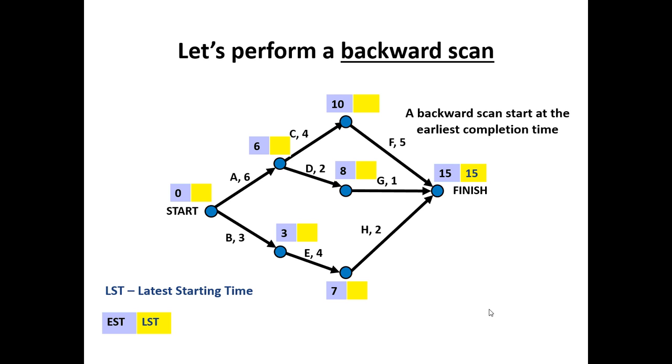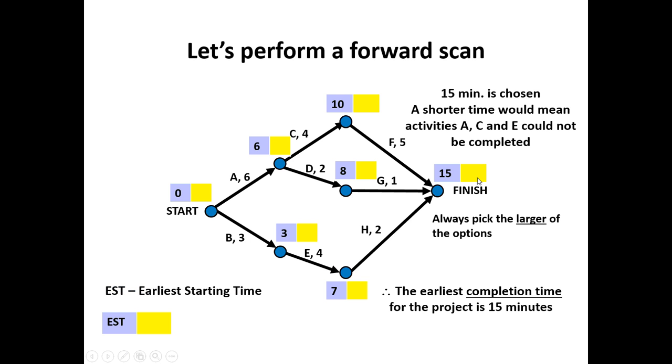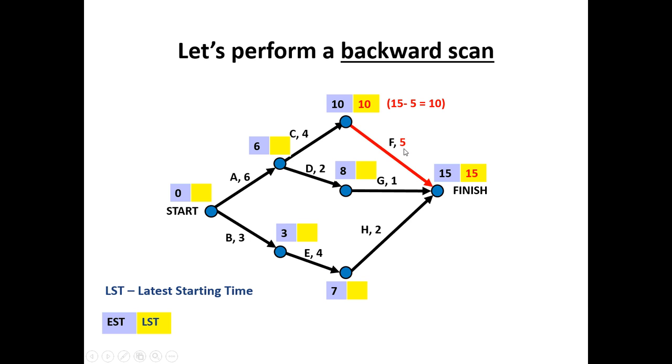Let's now consider a backwards scan. We're now using the yellow squares or rectangles. We start by copying in the earliest completion time, fifteen, into the first box. Now we work backwards. Fifteen minus five gives me ten. Fifteen minus one gives me fourteen. Fifteen minus two gives me thirteen.